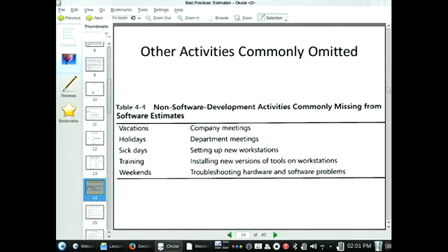Because it comes down to one person. Comes down to, and what could happen to that person? Let us count the things. Give me one. Okay, they can be hit by a bus. You hear software projects elsewhere in Saskatoon talking about their bus number. How many people have to be hit by a bus to immobilize them? And not in the sense of the people hit by the bus, but the project. Immobilize the project, progress of the project. You want to spread things around, raise your bus number so that you're less vulnerable to these things. What other things could happen to this person?